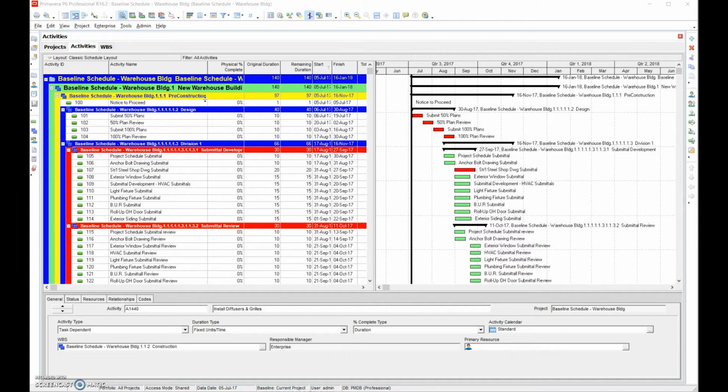We could do it simply by markers, or we can do it by drawings. I like using drawings because if we tie everything to the drawings, when problems occur during that process, we can simply say, okay, drawings C1 through C20, we had this issue, and it's easy to do a time impact analysis. But that's how we can break things down. It also serves as a way of motivating people to do their job.